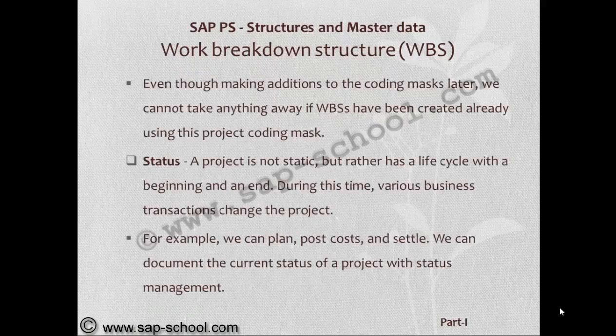Even though we can make additions to the coding mask later, we cannot take anything away if WBS elements have already been created using the project coding mask. Now see, the next setting is status. A project is not static, but rather has a life cycle with a beginning and end.